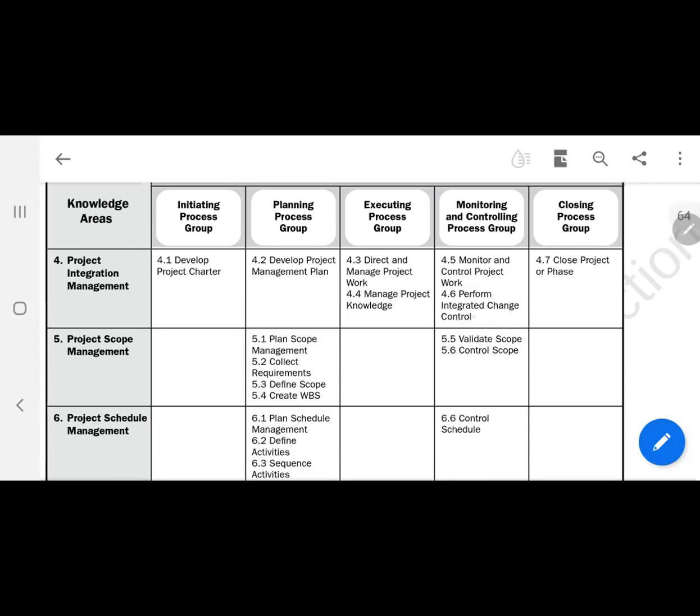The change request, usually perform integrated change control has a control board, the change control board, CCB. This control board is the board of people who sit and approve changes. They analyze the impact of a change request, and then they see whether the change request will be beneficial, whether it could be in the form of a corrective action, a preventive action, or a defect repair.